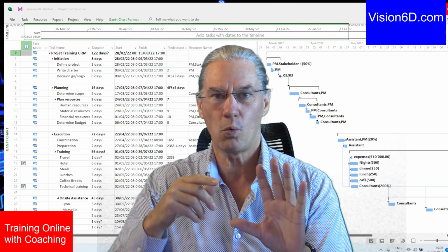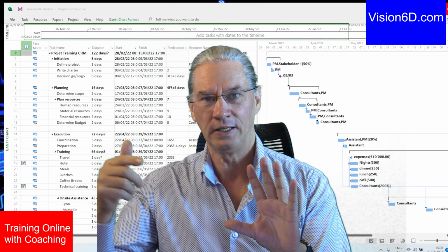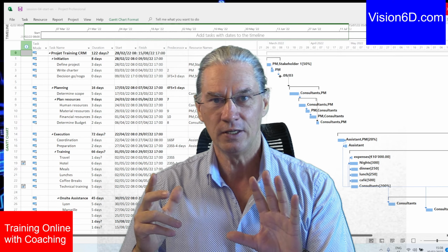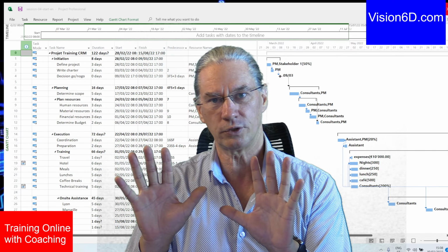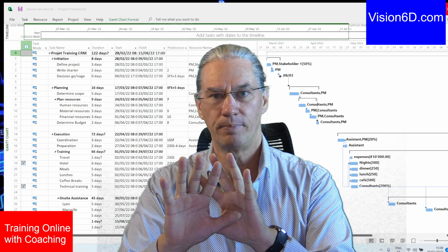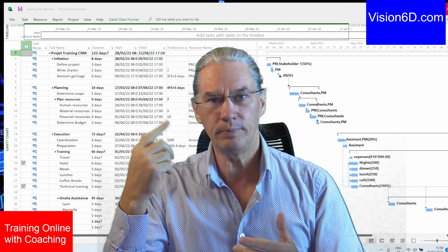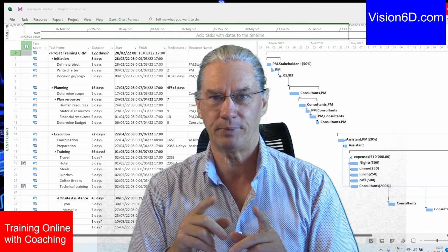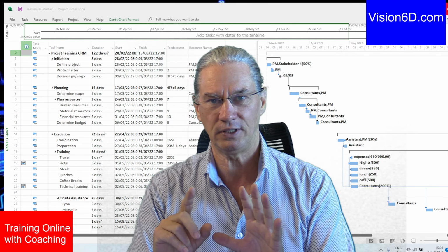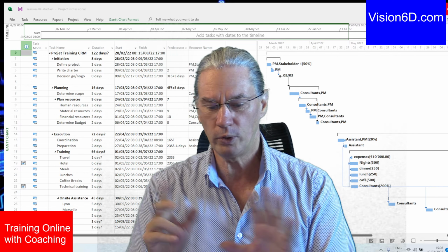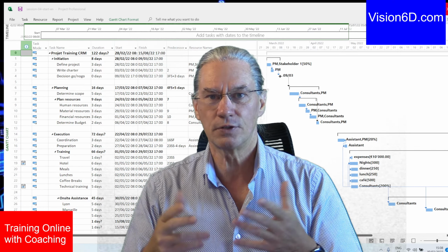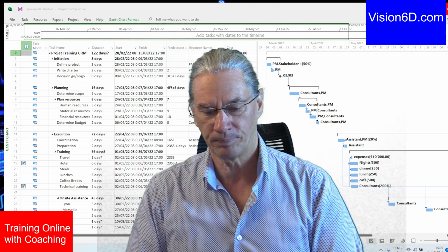And of course, while the project is evolving, there might be things that do not happen as we planned them. So from time to time, we want to be able to compare how it's evolving to the baseline. Like that, we'll be able to say something is happening we didn't plan, or it's more costly than we expected, or it's taking more time. We are maybe out of our tracks. So this is the use of the baseline.